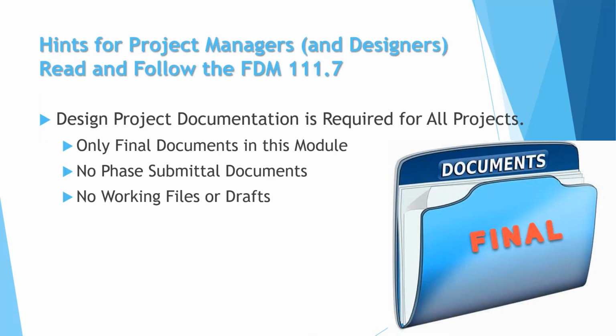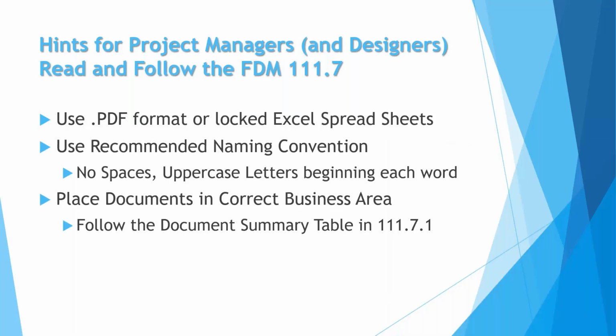Here are some hints for project managers and designers. Become familiar with Chapter 111.7 of the Florida Design Manual. Project documentation is required for all projects with the department. We do not want any working files, drafts, or phase submittals in this module. Only final documents will be placed here. Use the PDF format. If you have to upload an Excel spreadsheet, make sure it is locked.